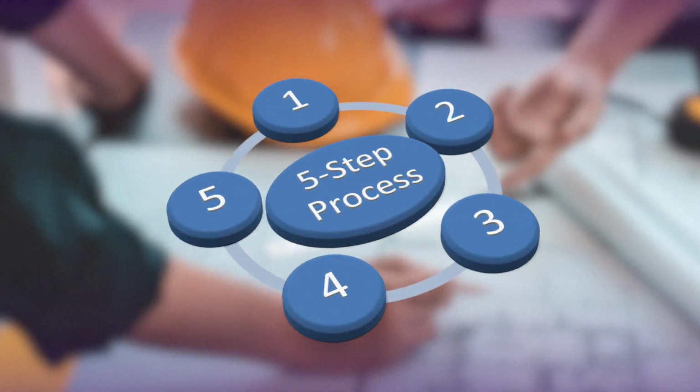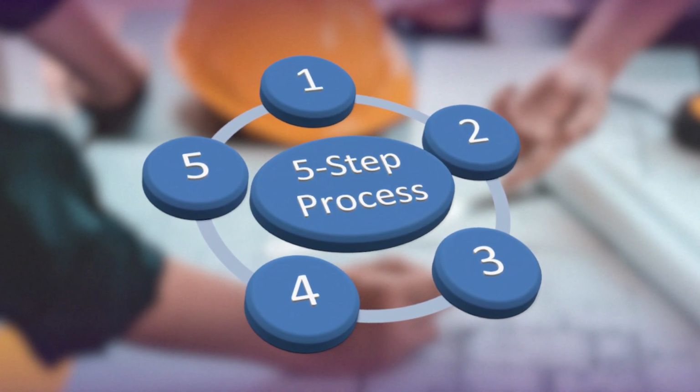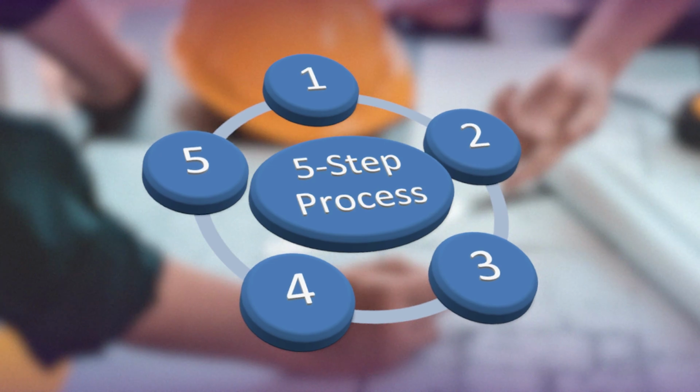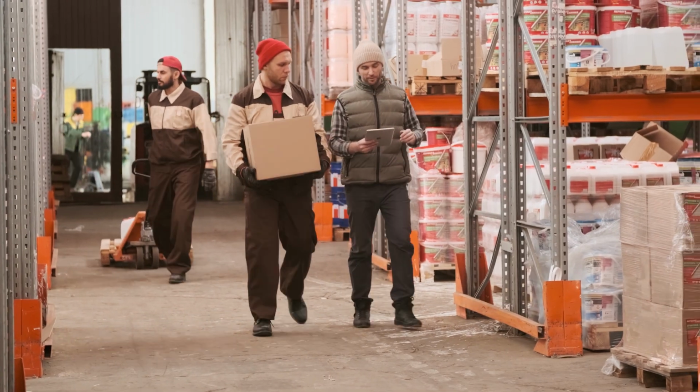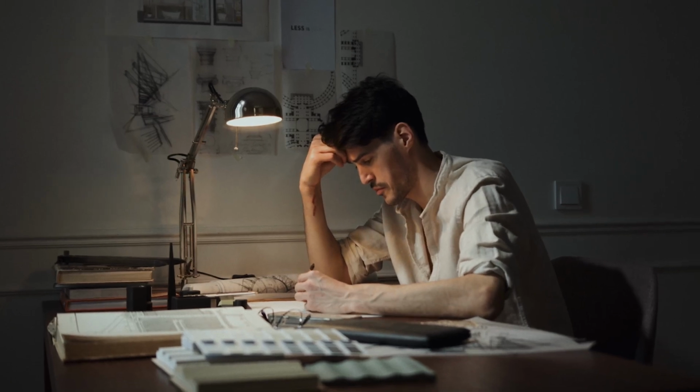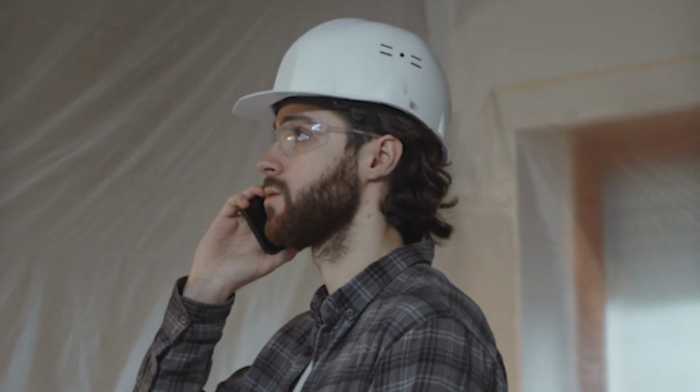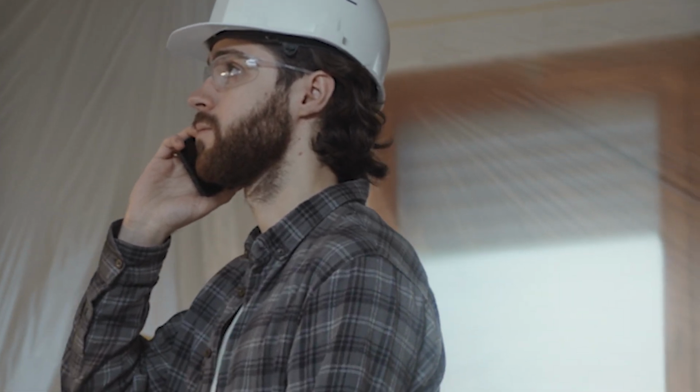Procurement is a simple 5-step process. It doesn't need to be any more complicated than that. We work out what we want to buy from the market, we define it properly in excruciating detail, we obtain quotes for it, we choose a preferred subcontractor or supplier, and then we manage them properly. If we follow this process properly, we'll maximize the value we get at the lowest possible cost.